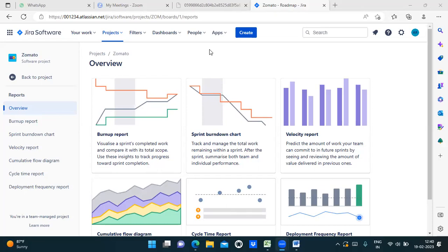Number one. Or if they don't agree to attach any issues to your current sprint, start a new sprint and work on those dependencies parallelly. So eventually that feature would be released.